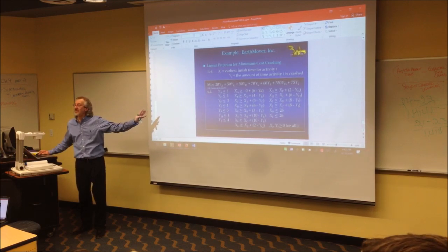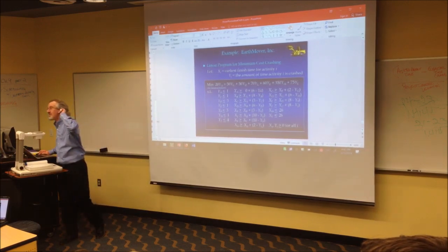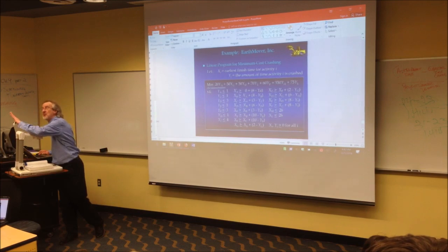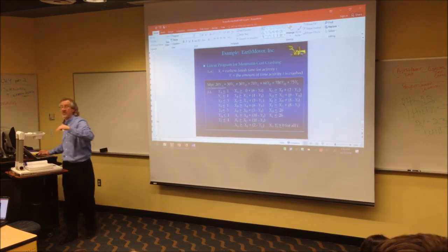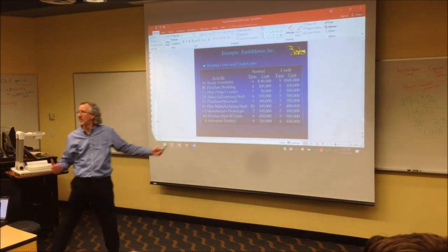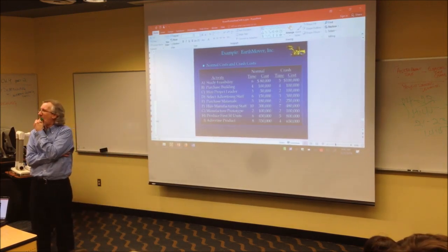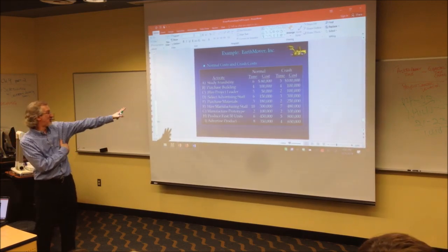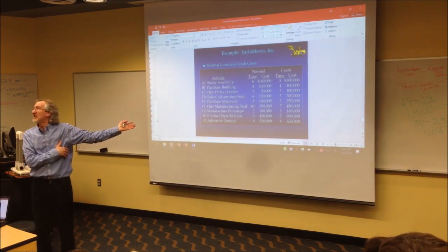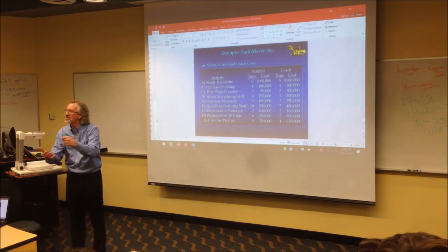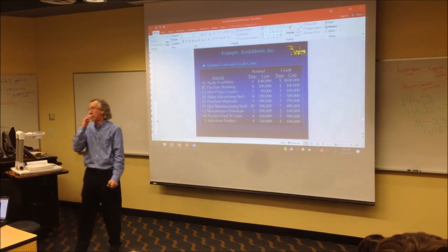George, did you say that you've got to jump to the least expensive activity to crash? You want to crash the activity, meaning taking some time off it, and spend the least amount of money you have to get it down in time. Then why do we need linear programming if I can just see which one is cheaper? Because right now you can look at it because it's such a small number of activities. In real life, you have 100 or 1,000 activities. You would have to be staring at pages and pages trying to figure out which one's the cheapest. All right, makes sense.